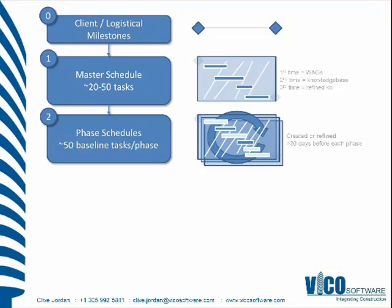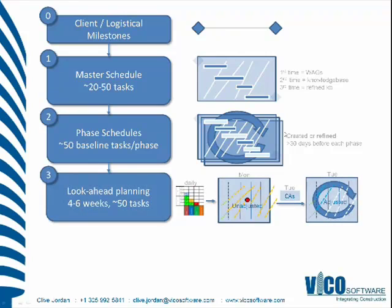We then look at phase scheduling, where each master schedule task can be broken down into a phase schedule for refinement — typically 30 days before each phase. This is where the look-ahead meeting comes in. In phase scheduling sessions, we try to get the people carrying out the work to commit to the production rates defined in the master schedule phase.